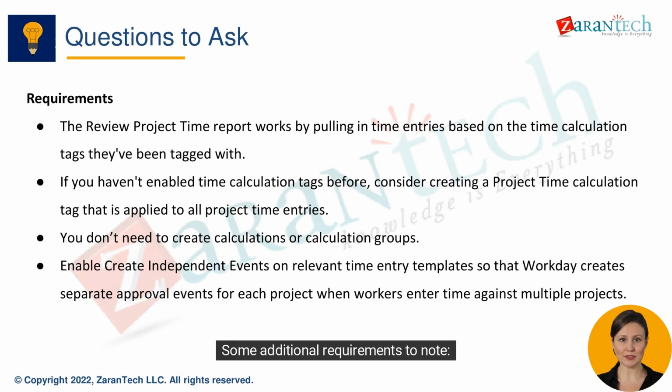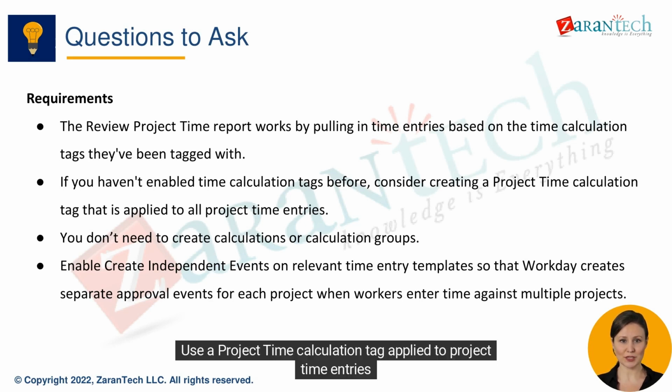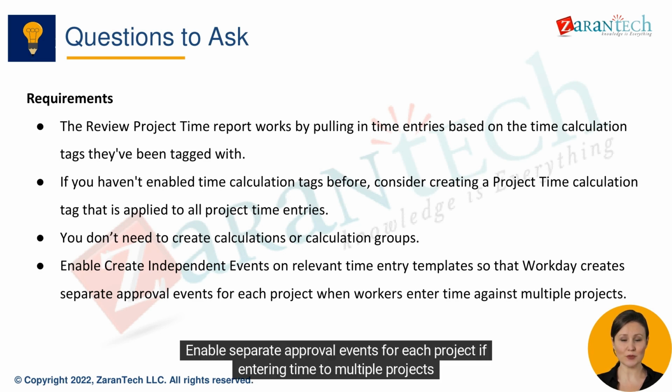Some additional requirements to note. Use a project time calculation tag applied to project time entries. Time calculation tags don't need full calculation setup. Enable separate approval events for each project if entering time to multiple projects.